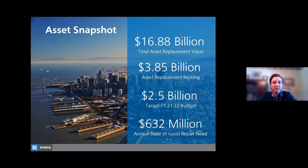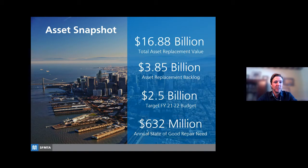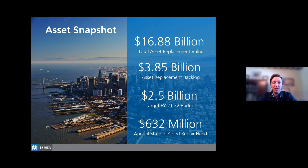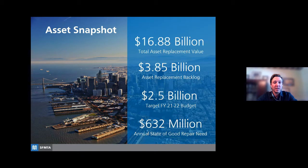As of our most recent inventory update, the agency owns and maintains nearly $17 billion of capital assets. It takes a lot of funding to keep these assets in a state of good repair, and we are always battling against our asset backlog, which is currently at $3.85 billion. Our entire budget — operating and capital combined — for one fiscal year is about $2.5 billion. Just to maintain our assets in their current condition costs about $632 million, roughly a quarter of our entire budget. That level of funding won't even begin to cut into the current backlog, so we need to be very selective and prioritize our investments where they are needed most.